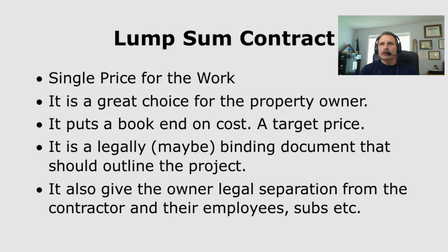The lump sum contract also gives the owner legal separation from the contractors and their employees and their subcontractors, etc. It places the legal definition of who's doing what and who's responsible for what. So if something happens, nobody's going to come back to you trying to say that these people were your employees.